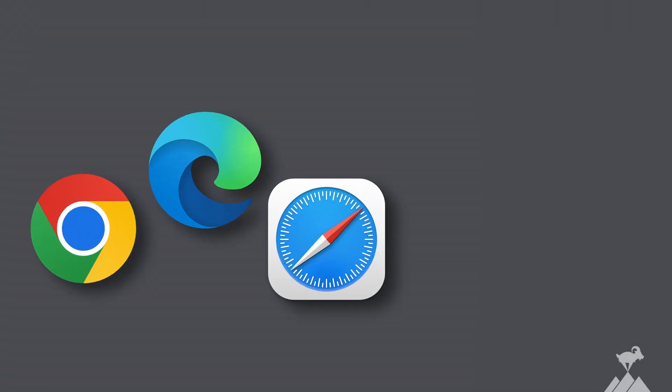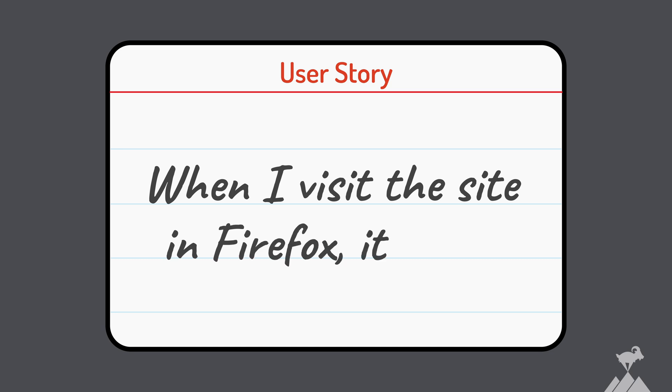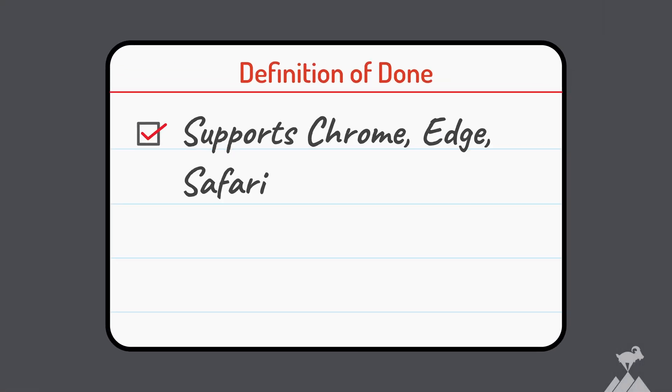Let's say you support Chrome, Edge, and Safari, and eventually you want to add Firefox. To ensure you don't forget to do that, write a story: 'When I visit the site in Firefox, it works.' When that story bubbles up in priority, do the work to implement it. Then update your definition of done to say: supports Chrome, Edge, Safari, and Firefox.